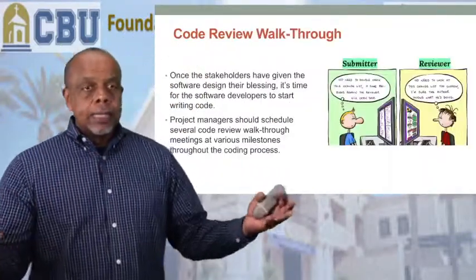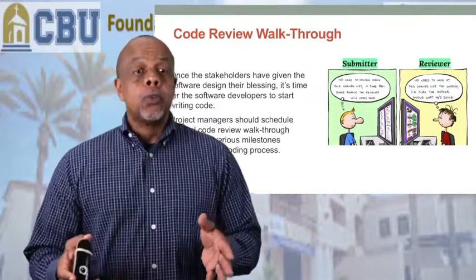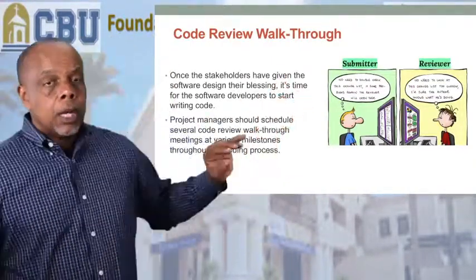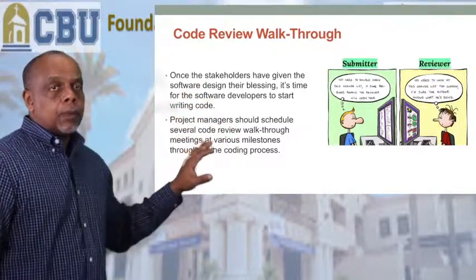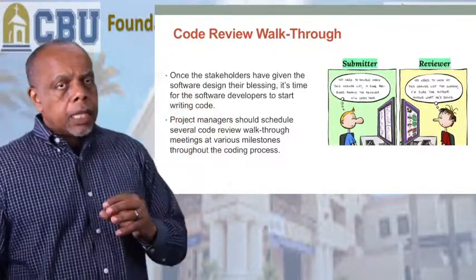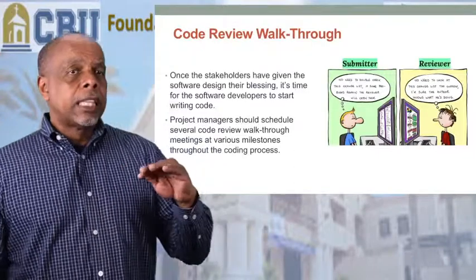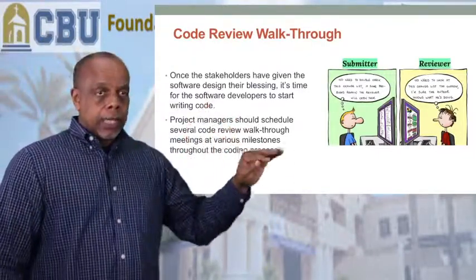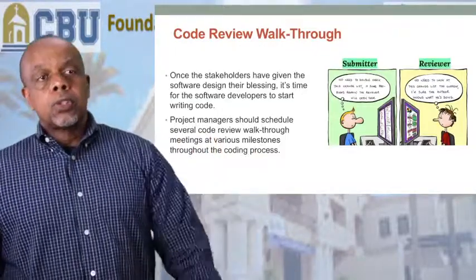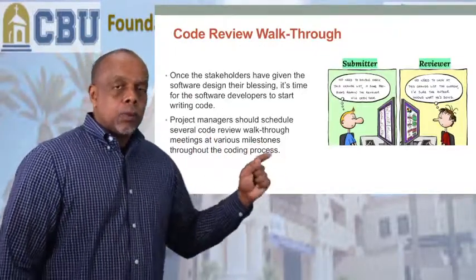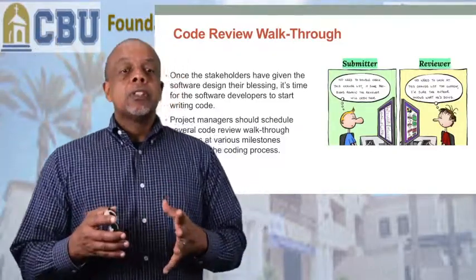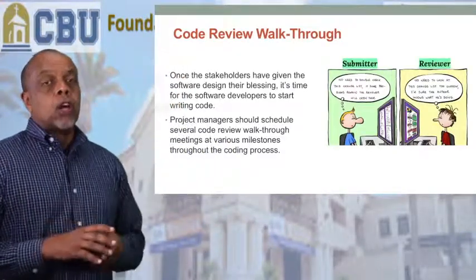Now, if you got code written, you want to do a code review. So we've gone from a design review now to a code review. And here again, that happens after the stakeholders have given the software design the blessing. All right, design is good. Now the coders start coding, but now really that's when project management kicks it up another notch. And that's when you start scheduling your code reviews and code walkthroughs.